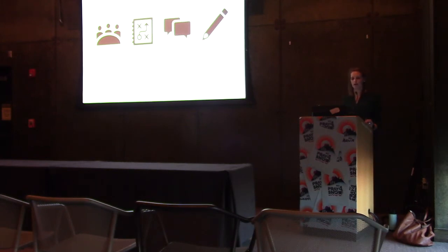And then just a quick overview. So again, there's a variety of agencies that regulate wetlands: Corps of Engineers, WCA, the DNR, watersheds, PCA, and then locals. Make sure you're evaluating your projects early to determine if impacts are likely or if they can be avoided through project planning. Unavoidable impacts require some type of approval, so coordinate with regulatory agencies early, and then thoroughly document your project needs and your sequencing efforts. And again, just try to keep your applications as thorough and transparent as you can so that it's clear to the reviewers what is happening on the project and why it's required.